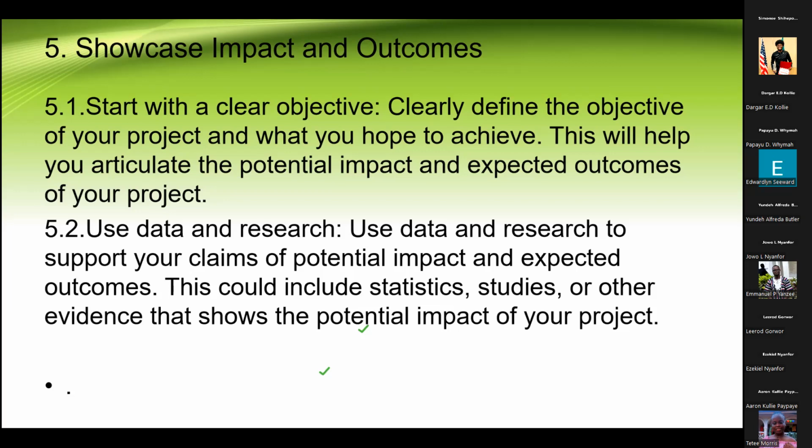So you can use existing information of other countries and other projects, but the problem is in your community. So there will be a baseline. You put the baseline in your proposal. And then if there's a baseline, there must also be an end line in your proposal. And that is separate from monitoring and evaluation. Sometimes there is a need for research first, and a need for a baseline after research has been conducted.